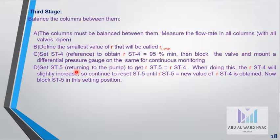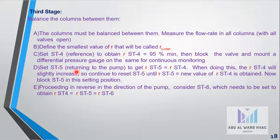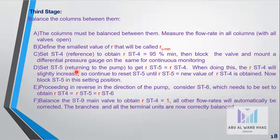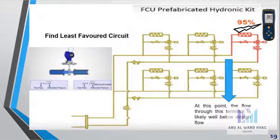Block ST5 in this setting position. Then proceeding in reverse in the direction of the pump, consider ST6 which needs to be set to obtain R_ST4 = R_ST5 = R_ST6. Balance the ST9 main valve to obtain R_ST4 = 1. All other flow rates will automatically be corrected. The branches and all the terminal units are now correctly balanced.